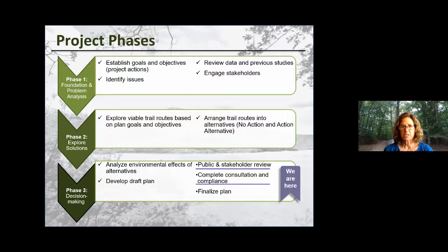So you can see at the bottom, it says we are here in phase 3. Phase 1, as Josh mentioned, happened pre-Carr Fire. This is where we established the goals and objectives of the plan. In this phase, we're really setting the scope. For those of you that are familiar with the National Environmental Policy Act of 1969, that is the planning process that we, the National Park Service, and all federal agencies follow to plan and assess the impacts of the actions in a plan.